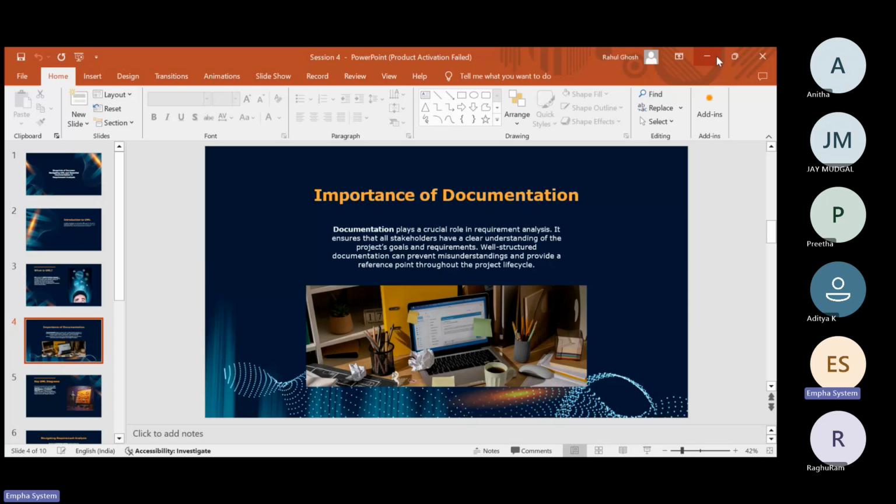So I did all the documentation, and after that they denied some of the things. They said, okay, we haven't asked Rahul to do this. But as I have maintained those documents, it helps us prove in court that we developed those things because of the client's needs. We didn't develop them just because we felt like it. We took all the approvals, the whole approval process has been covered. We have the mail copies, we even have a digital signature on those documents, and it helps us prove our point in front of the court.